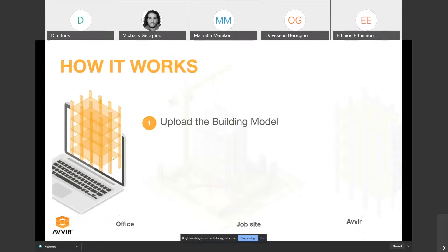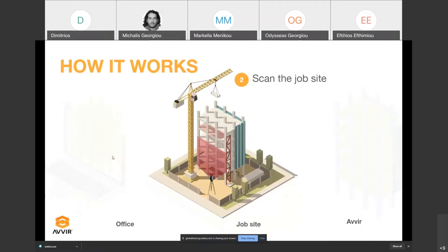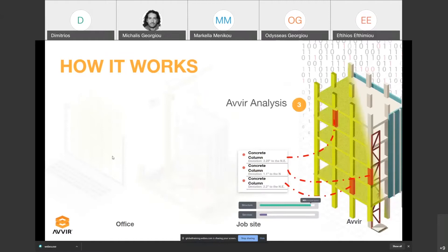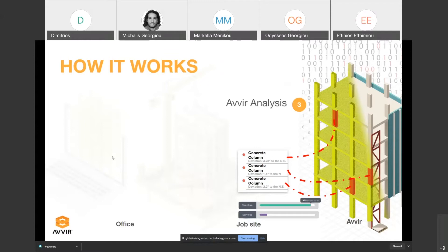Customers have the ability to upload the BIM model from their office on AVIR's platform. The second part is that either the customer or a third party company can go on site and scan the job site. Once they upload both the BIM model and scan on the AVIR portal, we can run an analysis by overlapping them to identify mistakes on the construction and the percentage of completion at any given time.